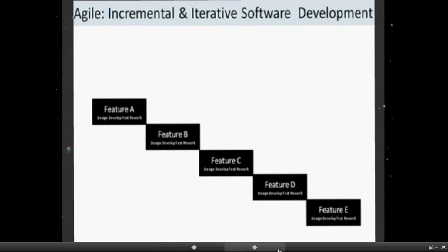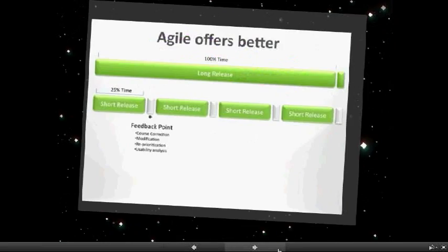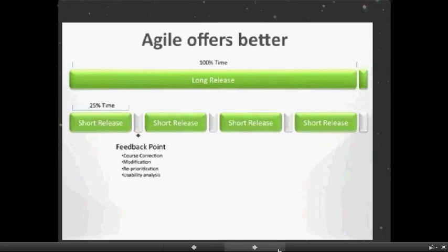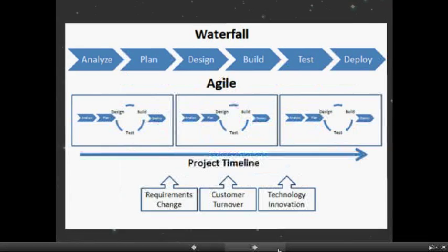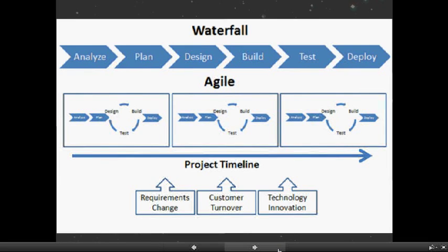When we come to agile development, you will still do the same type of work as you would be using in traditional methods. You create requirements and designs, you develop your product, and you integrate your product with other products as necessary. You test the products, fix problems, and develop it for use. But the difference in agile development is that we first look at only one feature. We go through all of these stages to develop this feature. After developing this, we move to the next feature.